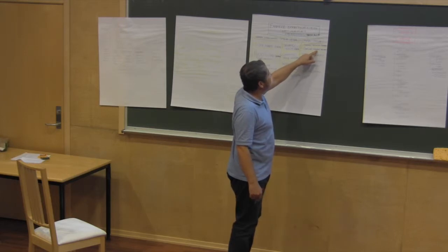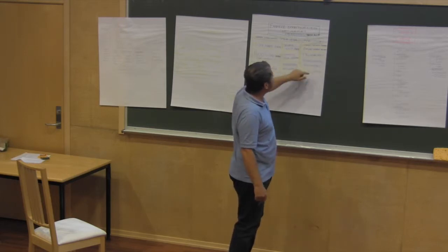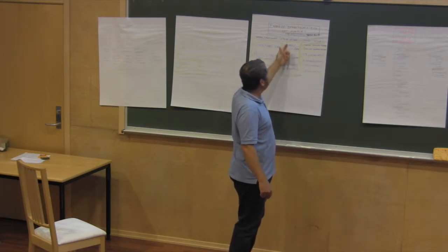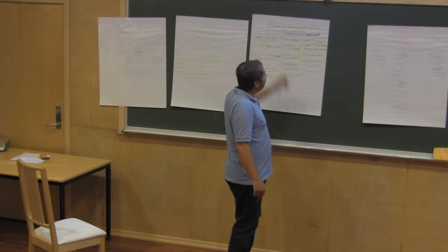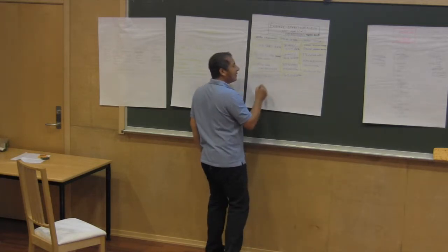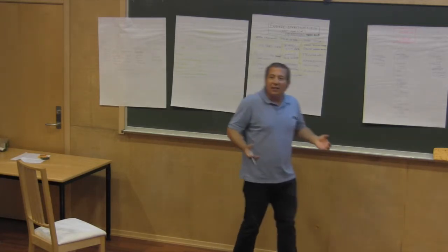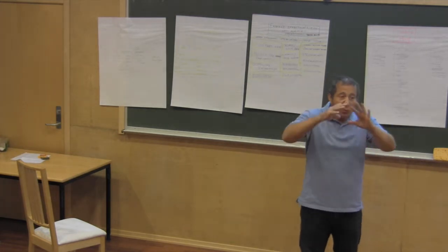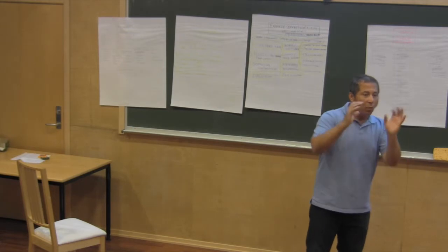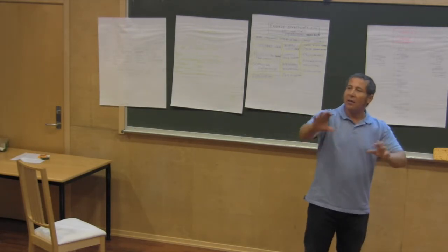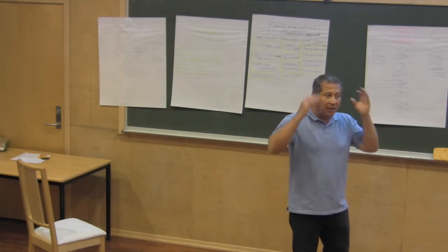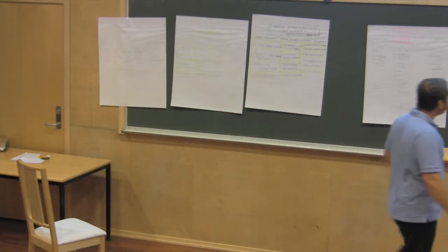Execute the training program is, it can be included here. The procurement, I'm not sure. They have already procured the system already some phase. So here again, you don't feel that you really have good understanding of this. You have to split. You have to show where the different tasks are located so that you can assign responsibility. You can reduce the misunderstandings.